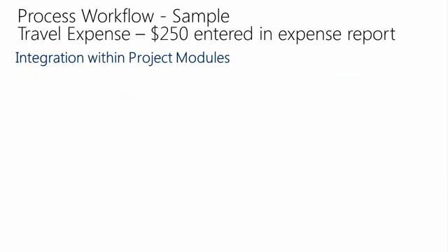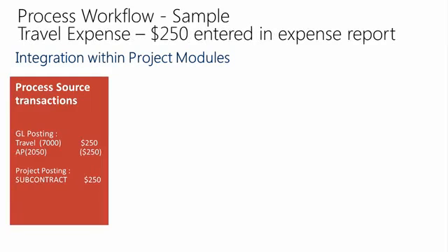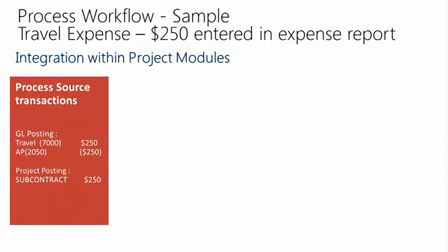The final example that we will look at is travel expense. So the travel expense is a little different in the fact that oftentimes with travel, we do not want to mark up travel. It's a pass-through cost. So we can also have pass-through costs that we can just bill at the same amount that it cost us. We wouldn't want to do that all the time, or the company wouldn't make any money. But there are specific accounts that are important to have as pass-through. So this is an example of a pass-through cost.